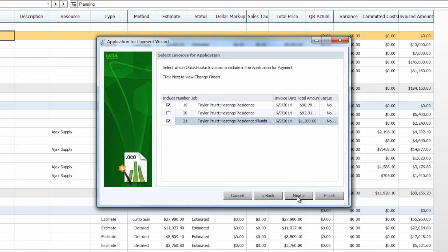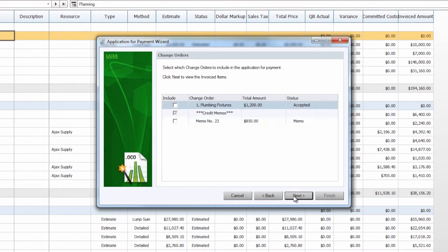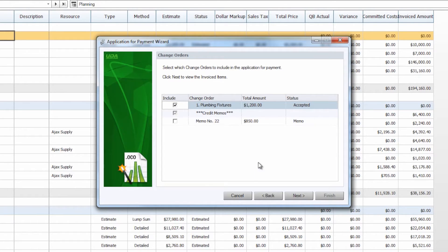Once we've selected those we can continue to the next screen, which will take us to our pending change orders. These change orders have been accepted in the Construction Suite estimate and sent over to QuickBooks, but they have not been included on a current application for payment. In this case we're going to go ahead and select our plumbing fixtures change order to include on this application and leave the credit memo for later.